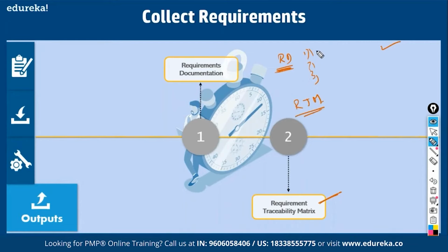So you have to map the requirements to the high level business need, that is, you want to be the market leader. Then you may have to map this to architecture drawings, then database procedures. Then for this particular prototype, you would have done a lot of tests: test cases, test scenarios, test conditions, test results. So you have to map it through all these, and only then you're going to sign off. That is called a requirement traceability matrix.